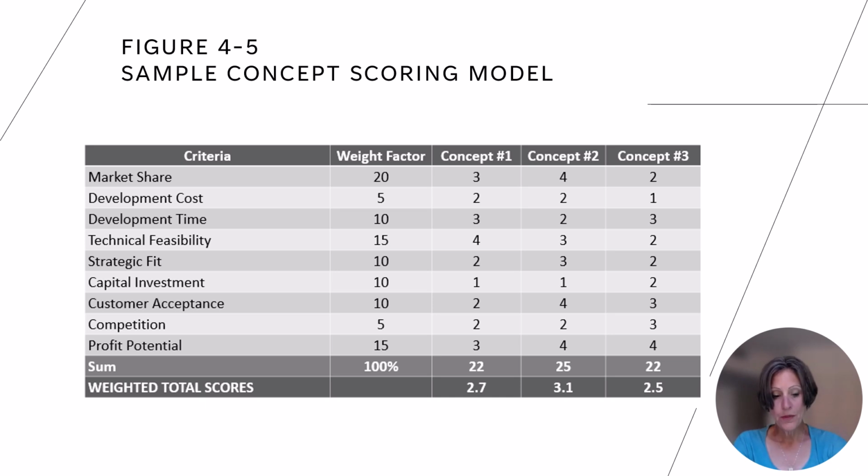Stage 5. While some organizations identify commercialization of the new product as a gate decision, the activities of product launch are better captured as a phase of work in the Waterfall NPD process. The key outcome of Stage 5 is to transition the new product to the mainstream business. Commercialization also establishes the post-launch review schedule for the new product, starting with team and process lessons learned at reviews.